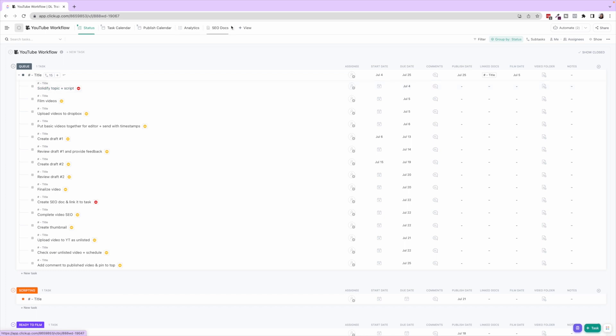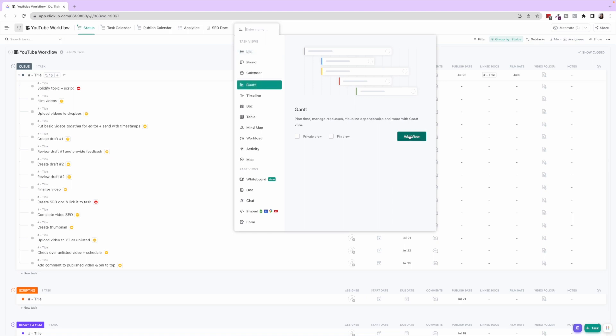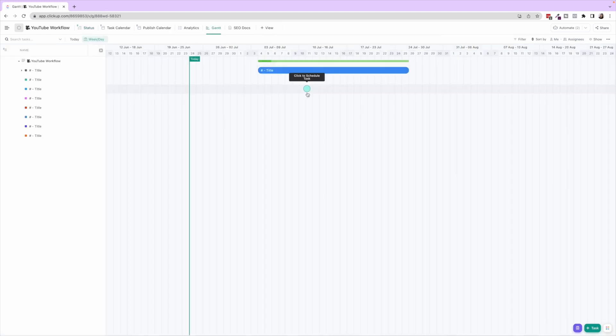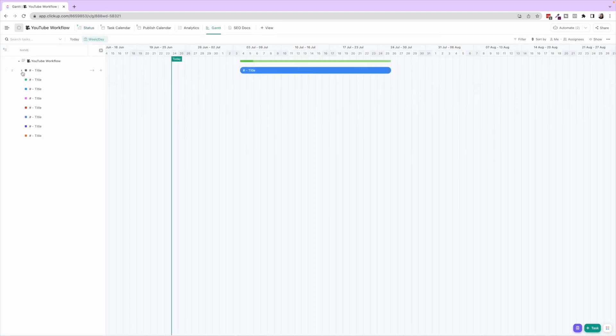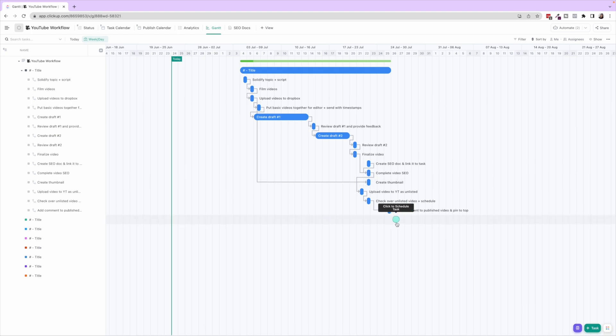You can also see, I don't have this in the YouTube workflow, but you can see in Gantt view it's really nice to be able to see how these dependencies all work together. You can see that not every single thing is dependent on each other. So Create Thumbnail, that's not dependent on Complete Video SEO, but instead that's dependent on uploading the video to Dropbox so you have the video content to create that thumbnail.